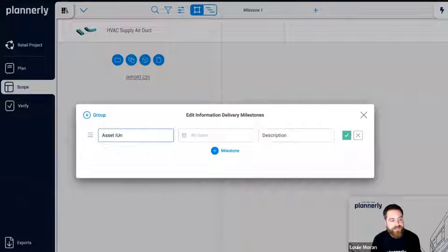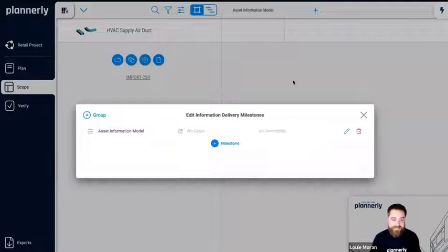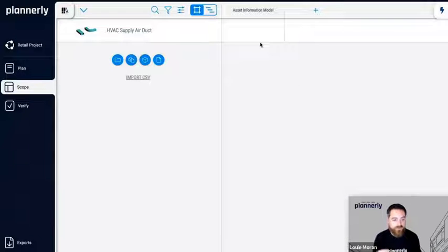These milestones are BIM uses, deliverables. Typically, these milestones fall under certain phases, DD, concept, and what are those bite-sized deliverables that you'll need out of the model? Whether it's asset information, handover, 3D coordination, a design review. Those are the types of milestones you'd want to add in here, and then work on the list that Clive had already dragged in for the HVAC supplier.